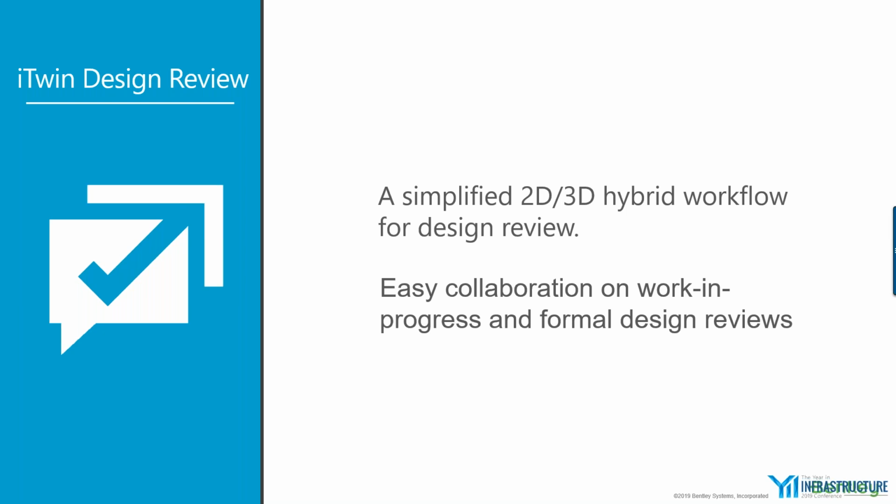We hope that we can save agencies a lot of money, because we know the further that you go down in the design process, the closer you get to completion, the more costly it is to make changes, and the more costly it is to find errors at that phase. And so the earlier in the process that we can enable design reviews to happen continuously throughout the process, the more money is able to be saved by identifying issues early on and having them resolved.